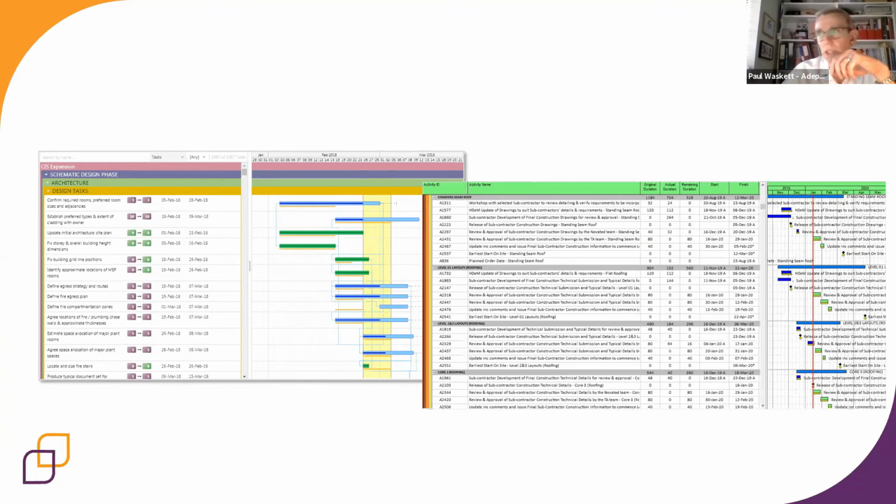And it's worth saying at this point that process modeling that I described a moment ago is a really crucial step in getting to this plan. If you just go straight to the plan, you invariably force yourself into planning a linear process, and you miss some of those interfaces and those interdependencies, because these planning systems are designed to model linear processes. So it's really important to do that process modeling as a precursor step.